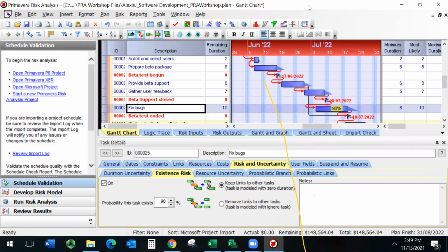Note that we're not talking about different critical paths of the project, but different possible critical paths to complete the project. So if we know the probability associated with them, then we can certainly choose the critical path with the highest probability as the critical path we're going to use for our project. And I think that's a very important question to ask.